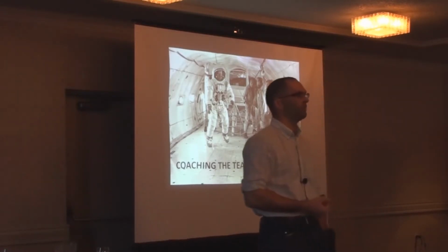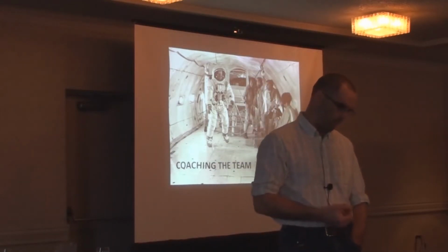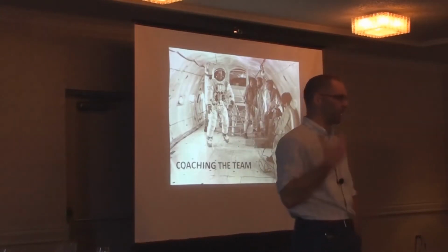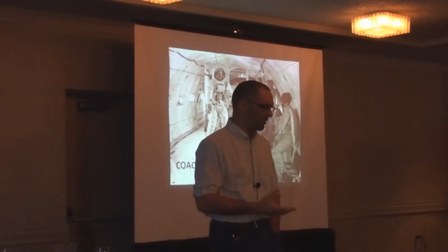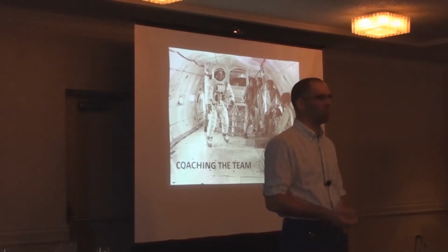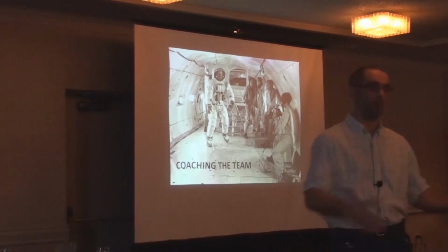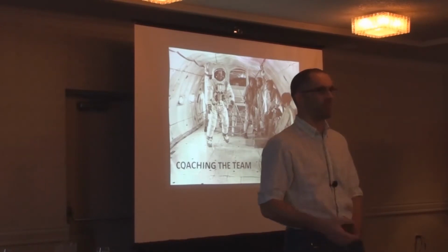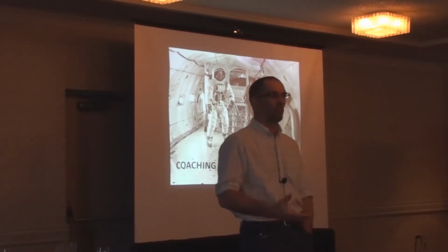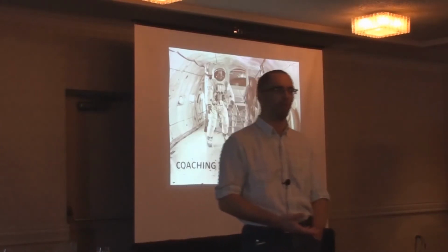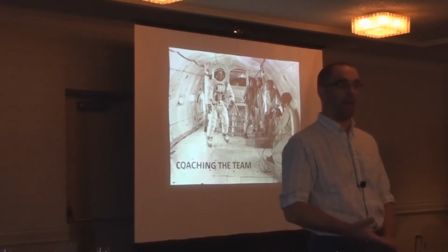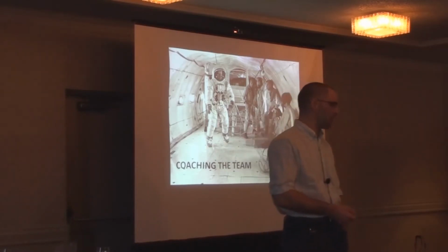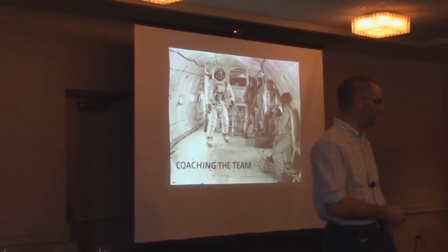I have a friend who's a Scrum coach. That's pretty much all he does. A guy called Mitch Lacey, who's based out of Bellevue. He expects a team to take around three-plus months to form. You throw a bunch of people in the room and about three months later they might be behaving somewhat coherently as a team. Well, if you're trying to coach a team that's distributed, he figures you're looking at about double that. So another thing we'll come to in a bit is this idea of not churning your teams.